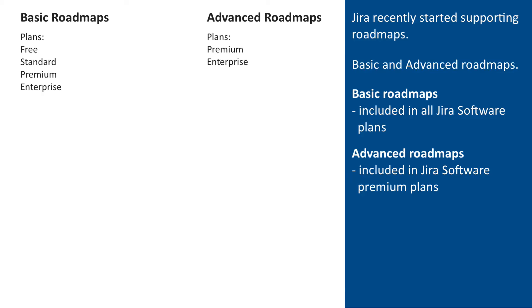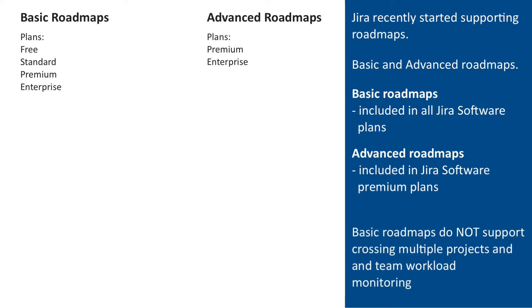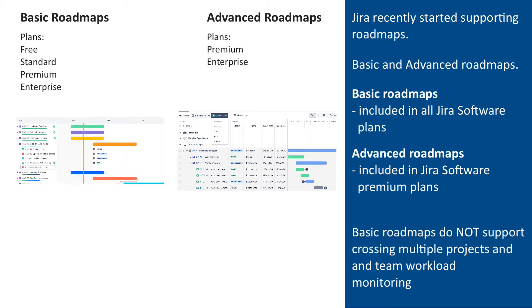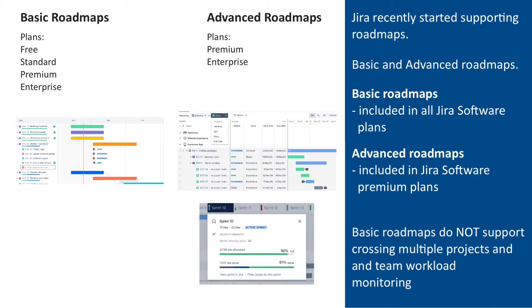There are two main differences between the two roadmap versions. The advanced version supports roadmaps across multiple projects, while basic is limited to a single project. The other difference is team member workload monitoring, which is available only in advanced roadmaps. In this video, I will cover the basic package.